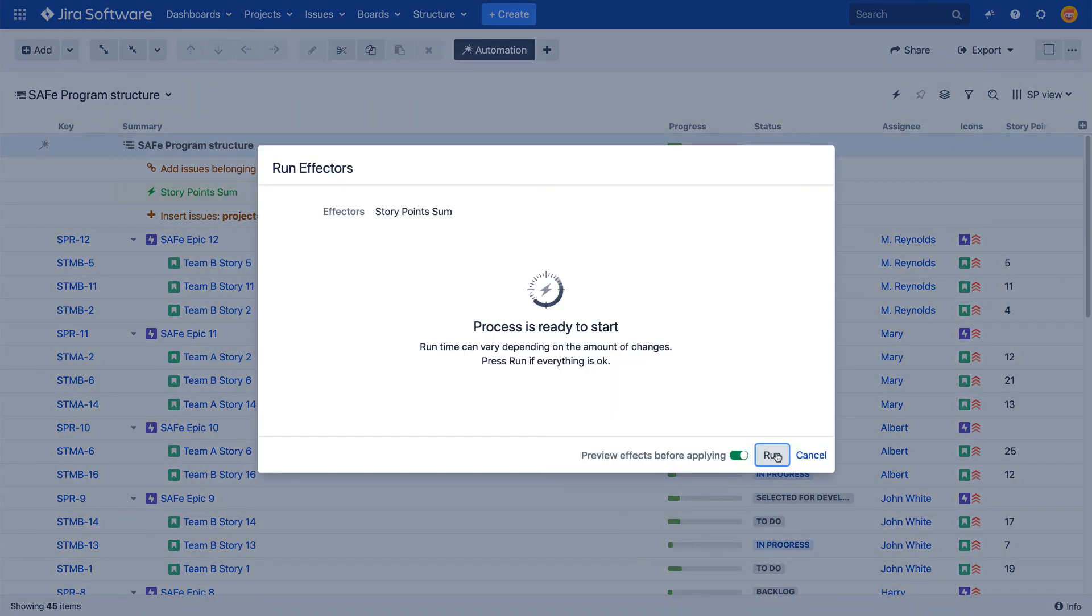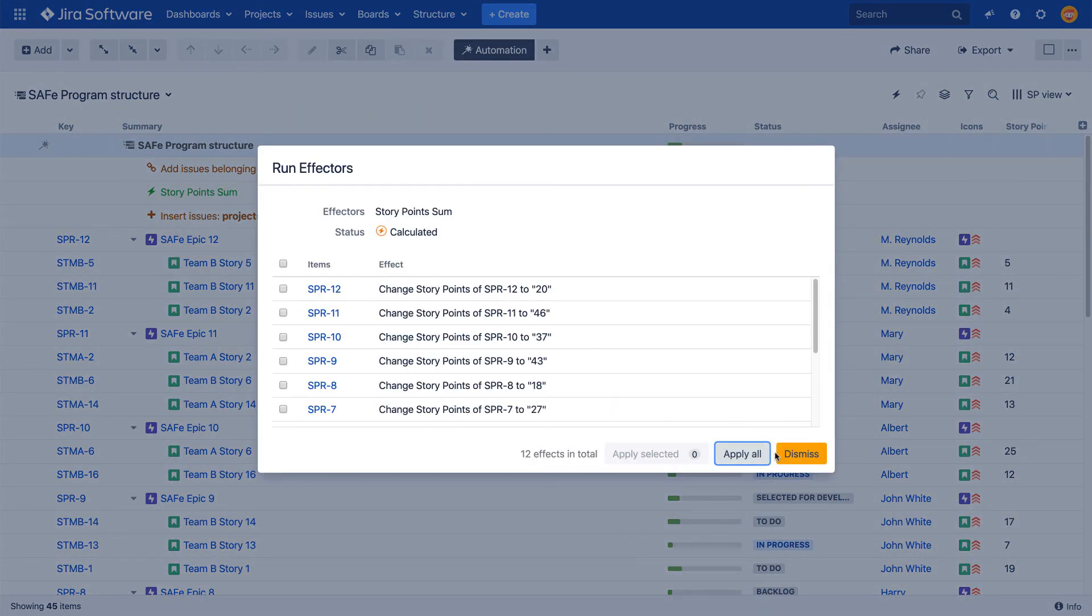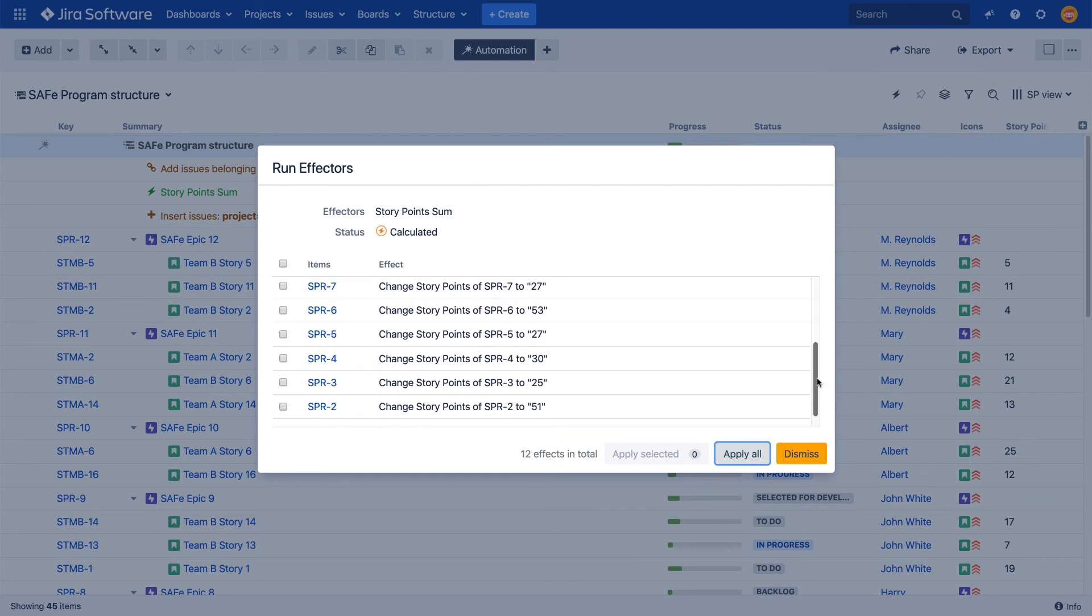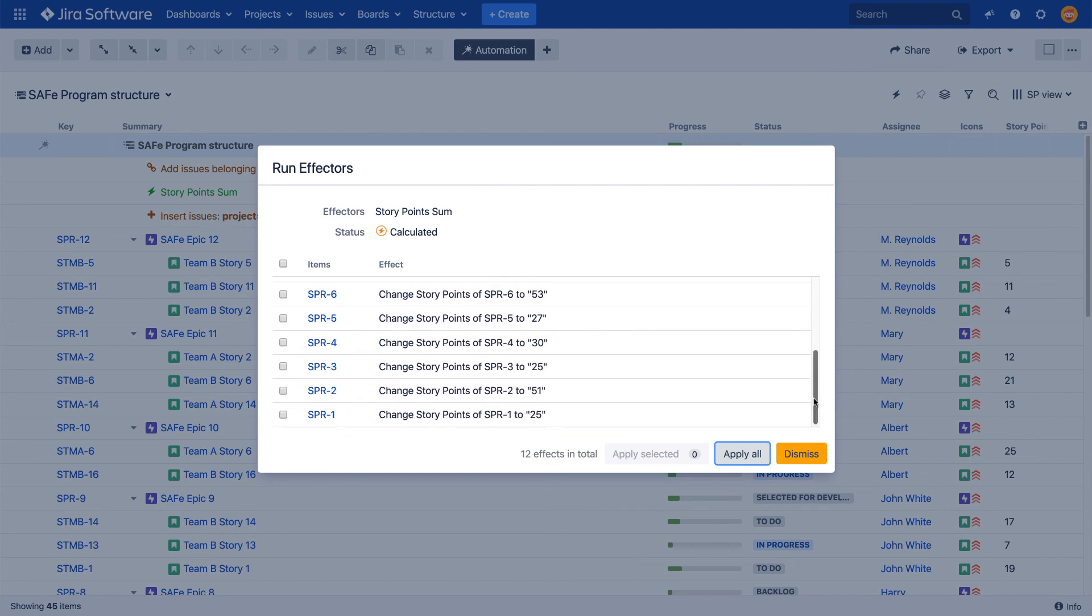And once the effector is launched and its run is completed, epics will be updated with the new story points values aggregated from the stories values.